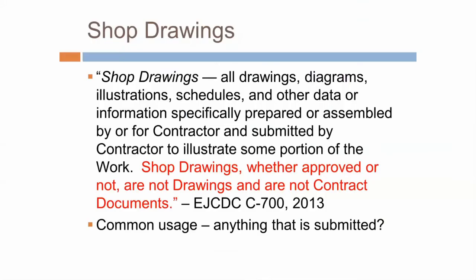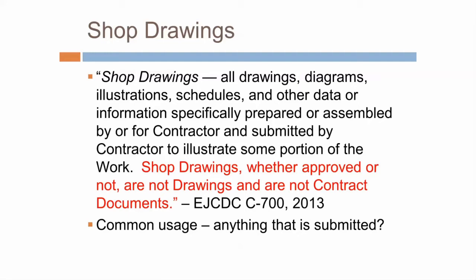First, let's talk about shop drawings in EJCDC. C700 is the name of the general conditions of the construction contract. The definition includes all drawings, diagrams, illustrations, schedules, and other data — the important parts being information specifically prepared or assembled by or for the contractor and submitted by the contractor to illustrate some portion of the work. The last sentence, though not technically part of the definition, is such an important concept that EJCDC decided to make it part of the definition.